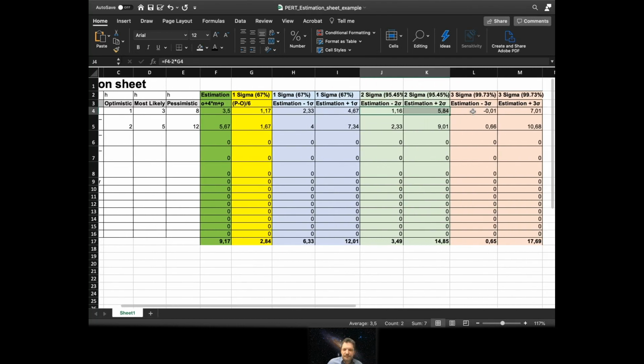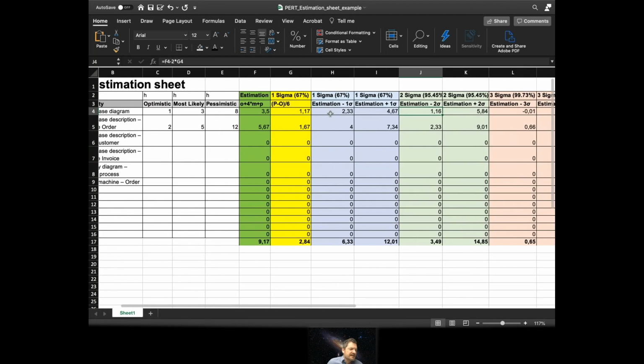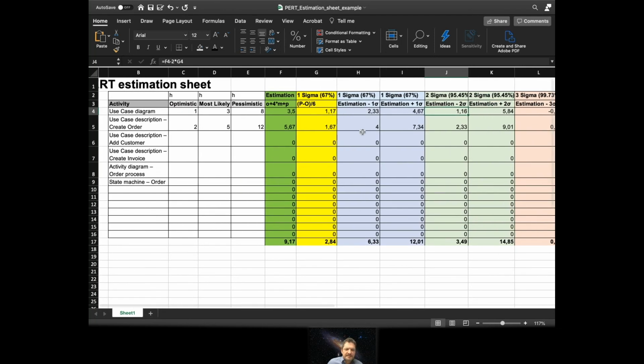In the end, you have to calculate with a specific confidence for all the tasks to come out with a really realistic end date of your project. But if you do it like this, it improves your estimations a bit. You can use it either for just getting to more realistic values with this 3-point estimation, weighting the most likely value 4 times.